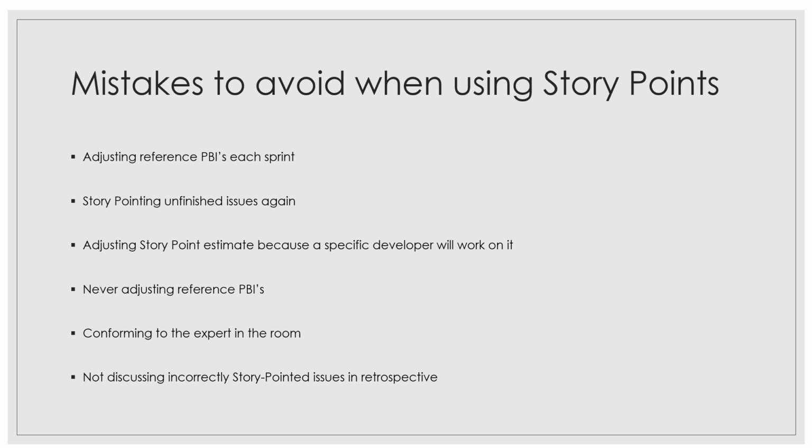Then also please don't do the estimate, because I have personally seen some scrum masters close that requirement, and they create a separate requirement for the next sprint and estimate it as just 1 or 2, and just put in things like testing or documentation. So that's not right, because previously you estimated the story as 8 considering all these aspects. Now you close it, so the amount of work that you estimated is done, and now you are again having another one which we estimated as 2 or 3 for the testing and documentation.